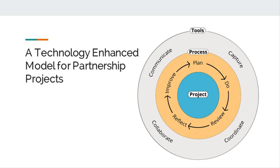The four stages are: Plan, where you set the goal for the sprint to develop something usable. The second stage is Build, where the team work on tasks to achieve the overall sprint goal. The third stage is Review, where the team and relevant stakeholders review each task created in the sprint and use defined acceptance criteria to sign the tasks off.